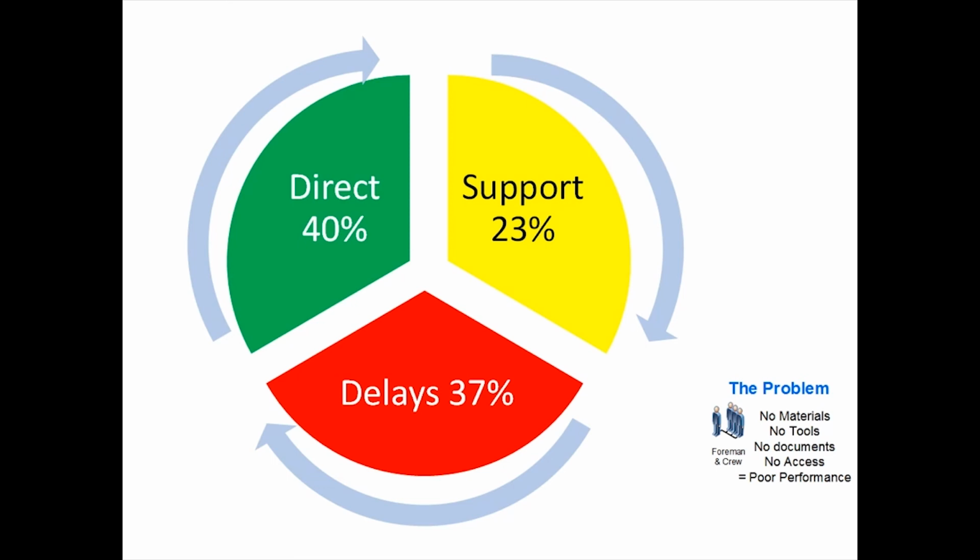That means that the average worker on the average project spends 4 out of every 10 hours doing what we want them to do. The rest of their day is typically a mixture of preparation and downtime while they wait for information, tools, materials or access. The good news is that this means that there are lots of opportunities on the table.